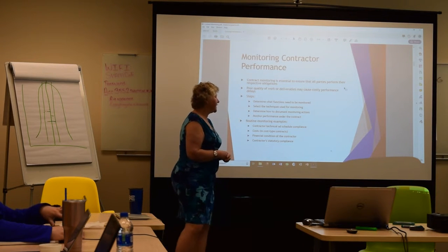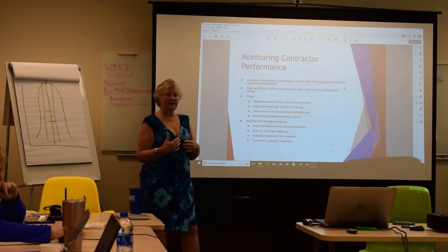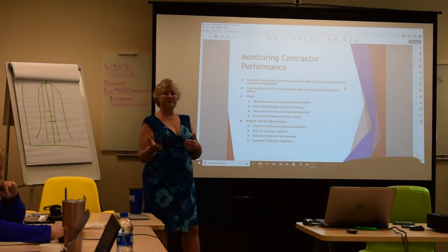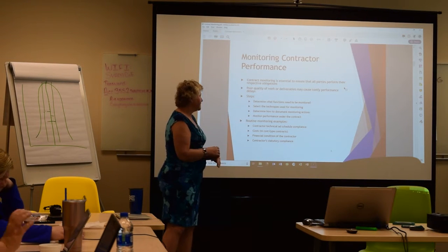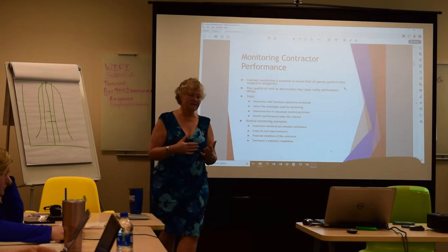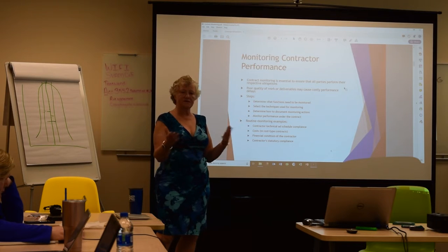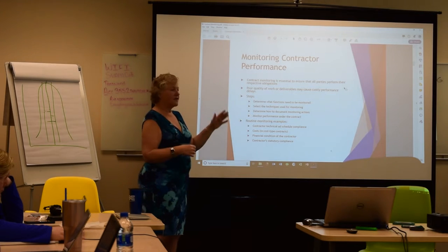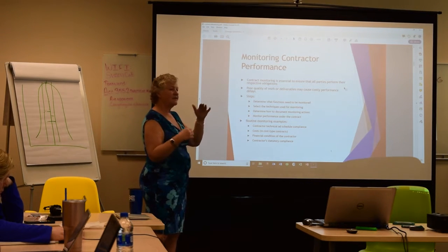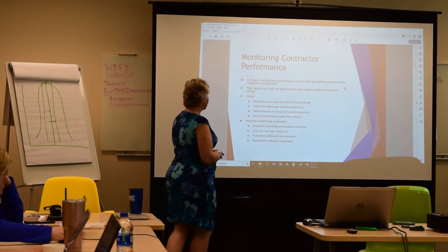They also have to determine how to document monitoring actions, how they have a file on you, and they'll document all these things and put them into that file. And then anything that's out of the ordinary or any kind of exception, we go up to the contracting officer. Routine monitoring examples. So, some basic stuff is they can just look to see that if you're producing a technical product, then it meets the technical specifications. Simple kind of monitoring. Or they could look at your schedule and figure out whether you're on schedule. Or they could look at the amount of dollars you spent and determine whether or not you're within the budget. So those are the kinds of things they can look at right off the bat.